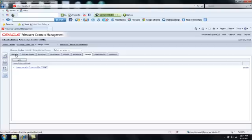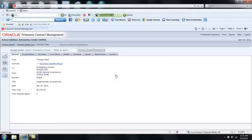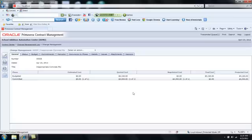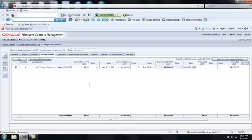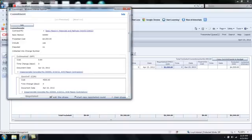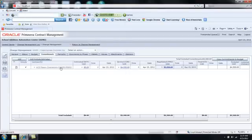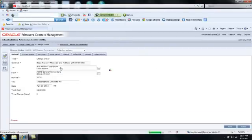So I'm done with the owner side. The owner has approved those dollars and has issued a final change order to me. I need to circle back and issue the final change to the sub. So I'm going to go back to Change Management. Return to Change Management. And I'm going to go to the Commitments. And I'll go ahead and edit Ace Mason's record. And I will now start the final phase of the change between myself and Ace Mason. So at this point, I've created a change order to Ace Mason for $4,300.